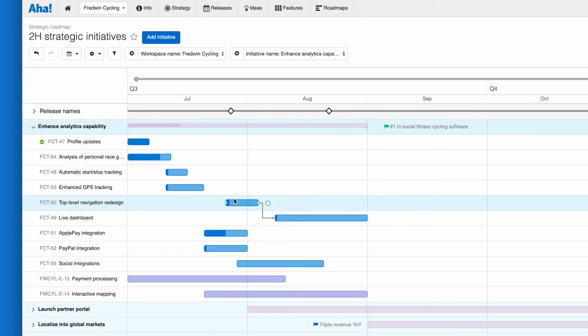Just like on the Gantt, you can create dependencies between records. And just like on the Gantt, you can click and drag to move records around and adjust their dates on the back end. This is not just a visual roadmap. Again, this is a living document. And you can see it turn red there if there's a dependency conflict. Maybe the same software engineer is going to be working on these 2 features, and so one has to be completed before the other one can start, or maybe there's an architectural dependency there.